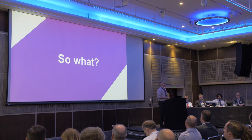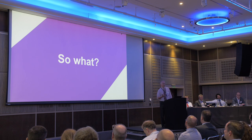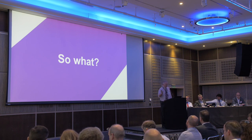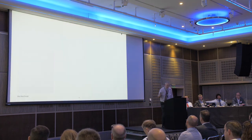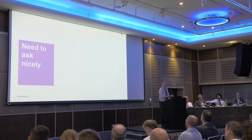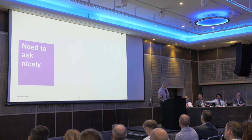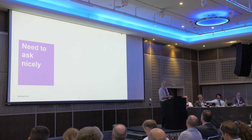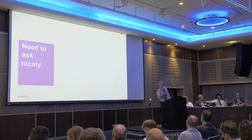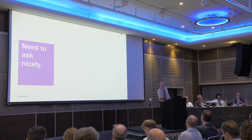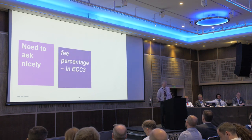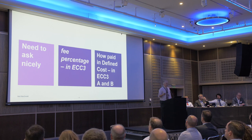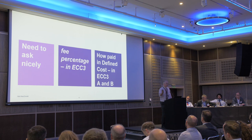So we've worked out what a subcontractor is — so what? The implications for the engineering and construction contract: firstly, the contractor needs to ask nicely to use a subcontractor but doesn't need to ask to use a supplier. In NEC3/ECC3, we've got two separate fee percentages and a complicated mess about how we pay the defined cost of subcontractors. That's what I'll talk about.